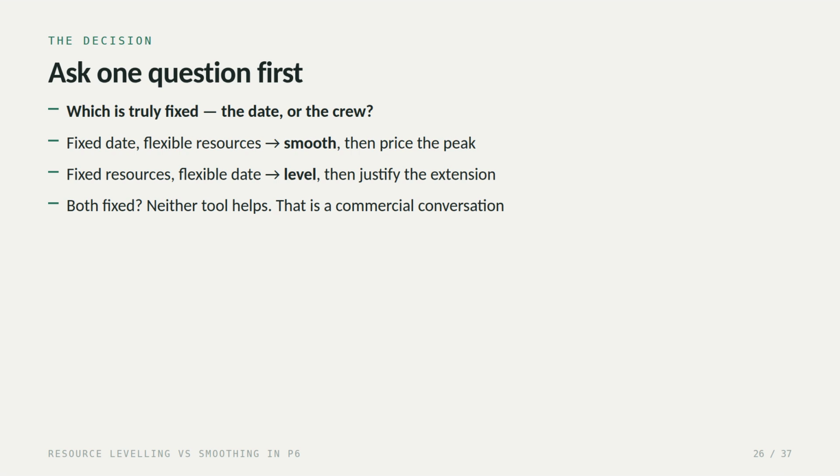Fixed date with flexible resources. Smooth, then price the peak and go and get the men. Fixed resources with a flexible date. Level, then justify the extension. And if both are genuinely fixed, neither tool will save you. That's a commercial conversation, not a scheduling one.